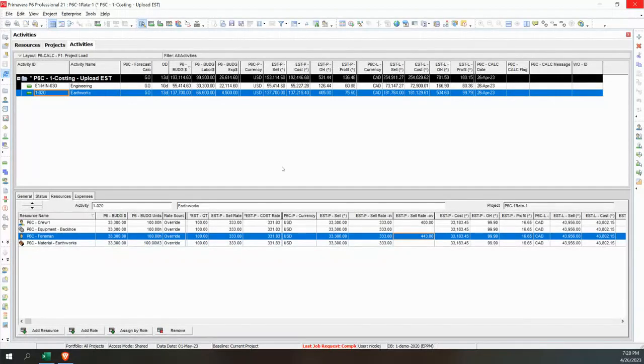Okay, and we'll just update it again. I just want it to refresh these, and then you'll see the way that this can work. So it's important to always give your team doing this kind of work in P6 the ability to override, okay? So when you're in an integration and you receive an actual value, let's say of 10 units installed, well, you might know that that's only 10 units installed and invoiced. But we know that we have a lot more units installed, but not invoiced.